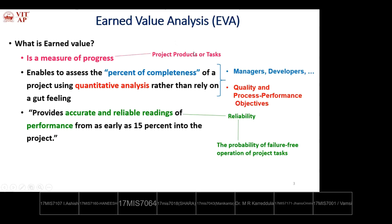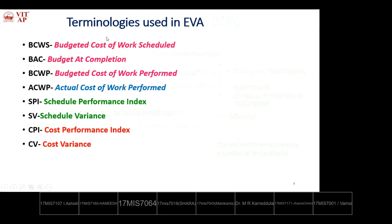Reliability here means the probability of failure-free operation of a particular task or the whole project. Once the project is started and 15 percent of the work is complete, we should begin inspections on the whole schedule — comparing what was proposed versus what is being implemented — and whether we are achieving the defined requirements in the software requirements specification.